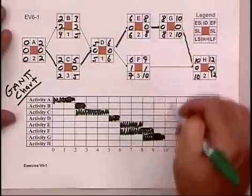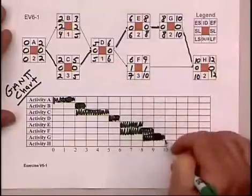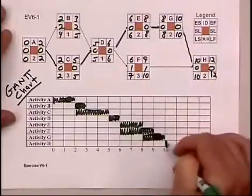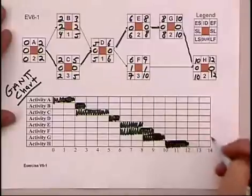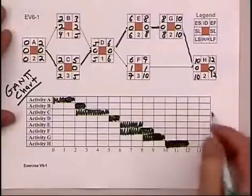That's not until the beginning of the tenth day, and that takes two days. So at the end of twelve days, the eight activities will be completed.